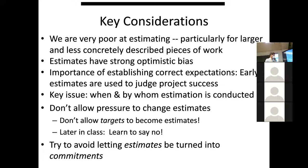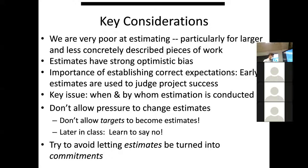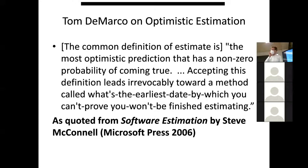A key issue is that project success is judged by estimates, and if estimates are not given by the team but imposed by managers, you're often in trouble. Sometimes managers take targets — things you aspired to — and turn them into estimates, saying 'You estimated you would get this done by Christmas.' No — it was something you aspired to, not an estimate of how long it would take. You have to be willing to say no, and tell people: I wish it were the case, but it's just not going to be possible.